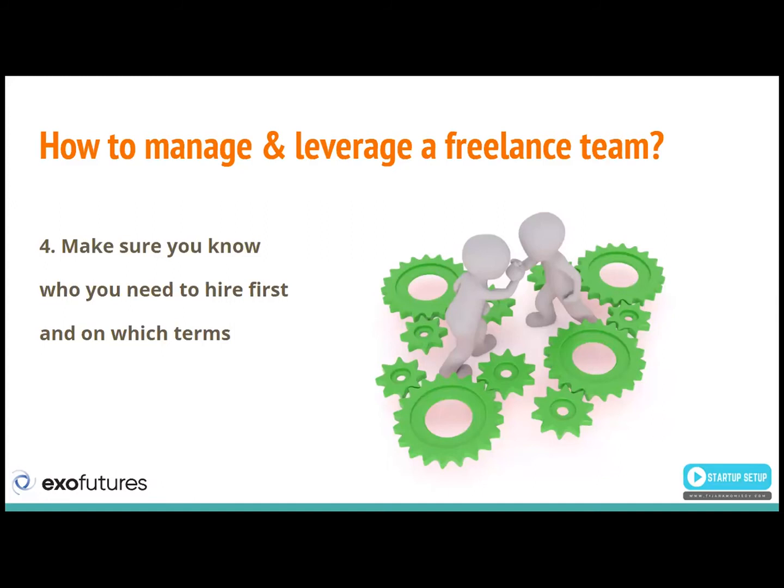For some roles, it's important and suitable to have a long-term full-time arrangement. So it's almost like a full-time job. That's, for example, the tech lead of your project, of your software development, like a core developer. For some people, you would like to have a short arrangement, but with a heavy workload. It can be, for example, a designer that's going to spend 1 month of full-time work to develop the mockups to start with.